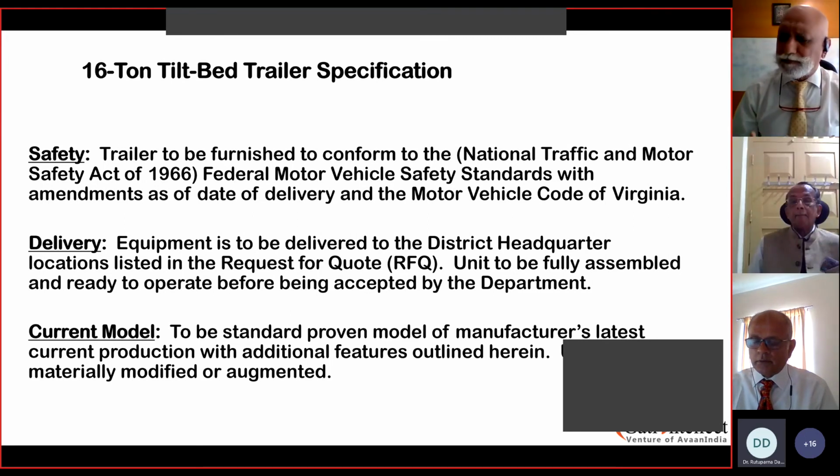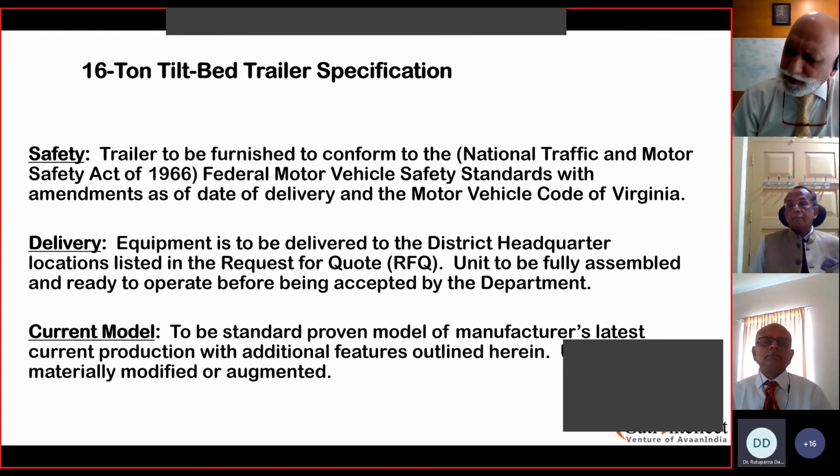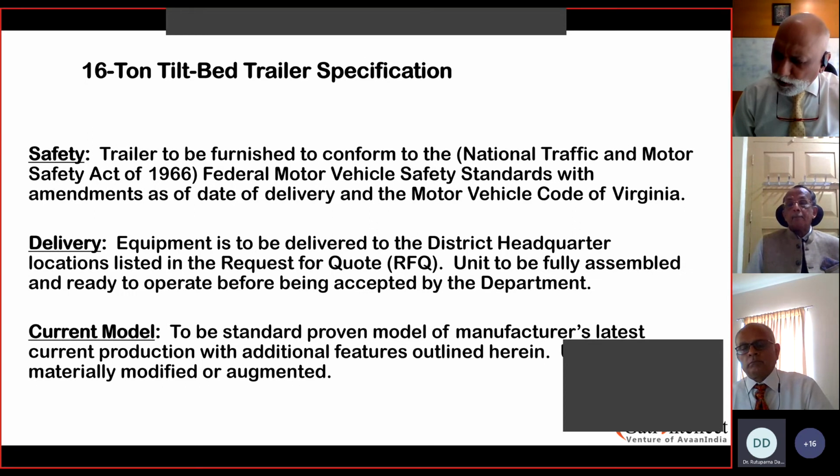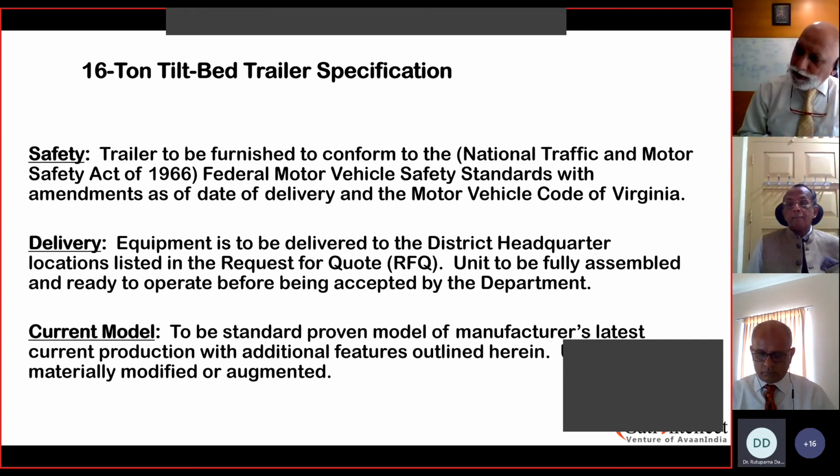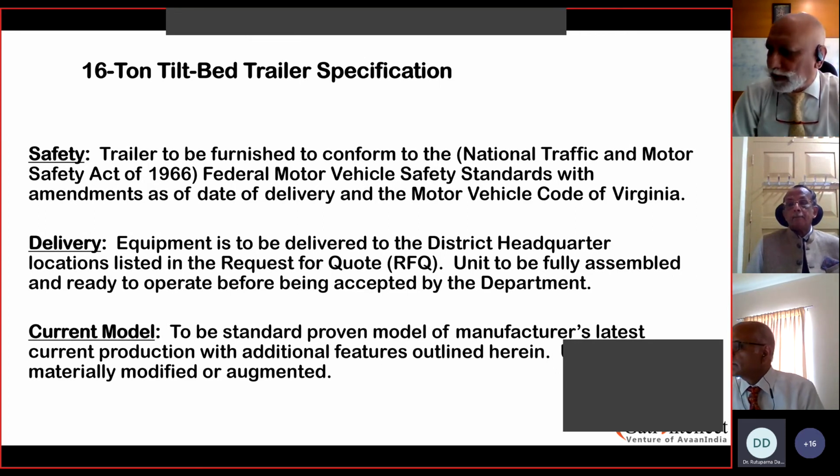Basically, what happens is that when a new equipment is launched, or any transportation equipment vehicle is launched with new models, all those vehicles have to get approved by the local authorities. Each state, each country has its own authority. And when the vendor is carrying out the operations, he has to select the equipment which should follow the law of land. So it may happen that the authority has given a specification which is currently applicable, but the equipment used is not compatible for that specification. In that case, it needs to have an improvement done and an approval taken on that.